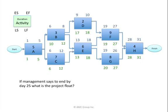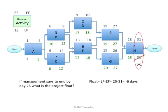The last question: if management says to end the project by day 25, what is the project float? Management is saying activity H needs to end by day 25. To calculate float: late finish minus early finish — 25 minus 31 equals negative 6 days. The answer is negative because the plan shows the project finishing in 31 days, while management says to finish no later than 25 days. Therefore, if we stay on the current plan, we will be 6 days late. I hope this example helped as you're preparing for the PMP or CAPM exam. Check back later for more examples.